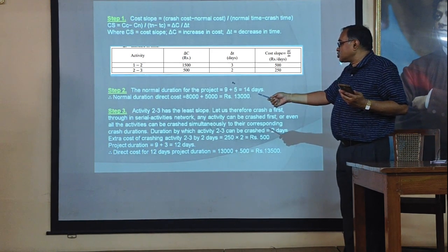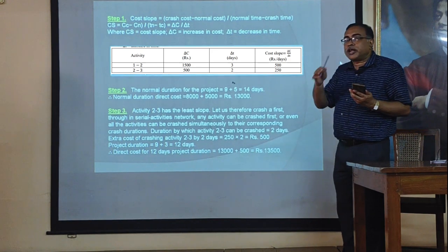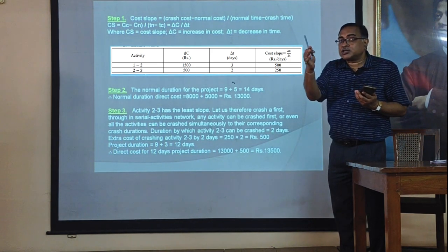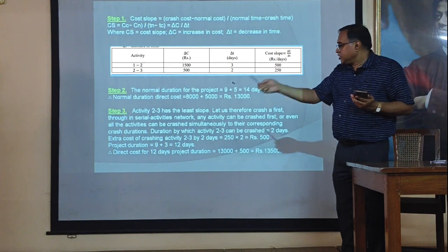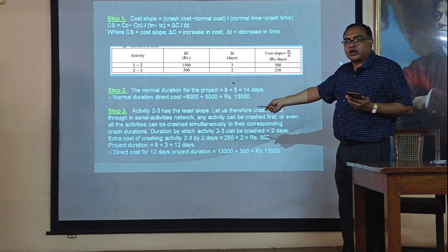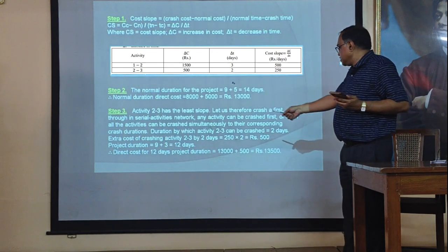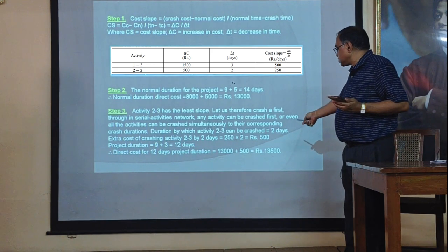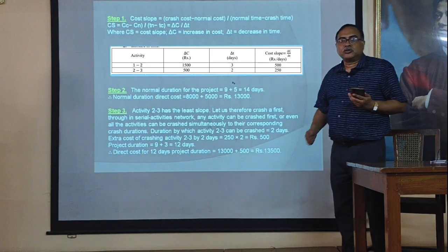Then the project duration should be 9 plus the crash duration, 5 minus 2, so 3. 9 plus 3 is 12 days in this case. And due to this, total project cost is 13,500. Okay, then